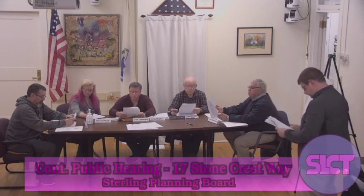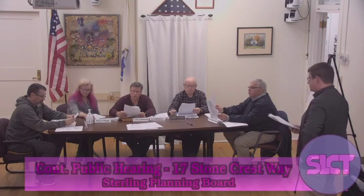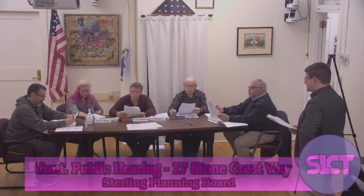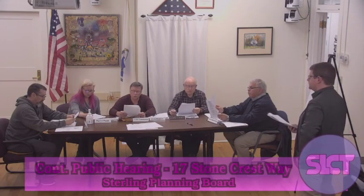Number 12, the standard operating procedure outlining the operation and maintenance, O&M, of the sand drying bed will be submitted to the Planning Board and Conservation Commission prior to construction. The O&M plan will also outline the schedule of residuals, turnover of the bed, and the plan for dealing with adverse weather events. This approval is based on the use of polymer coagulants.